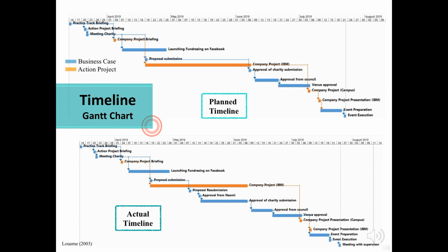The Gantt chart we show here is our actual timeline, which was almost the same as we planned, but we did face some challenges. The proposal submitted to the university on the 19th of April did not get approved. It required major revisions and was to be resubmitted. The City Council did not approve our proposal for Southgate. Gladly, our application for Pigeon Park was approved on 4th of July, but which still delayed our plan a bit. We visited the therapy center on 17th of July, which was initially planned for a time between 7th and 20th of June.